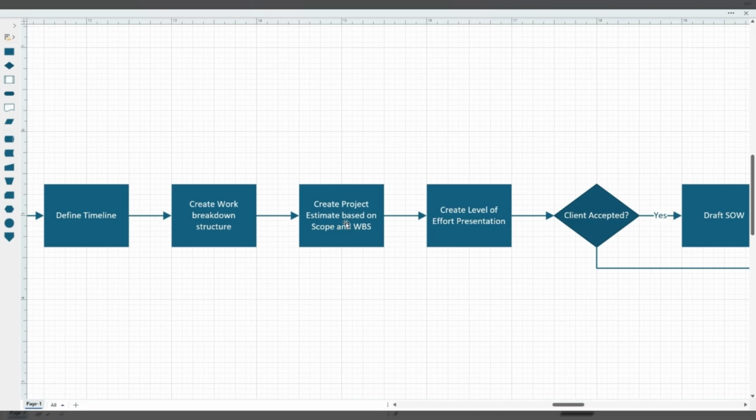This is difficult and very involved in the consulting world, because I may have an architect that is billed at a certain rate and a junior developer who's billed at a completely different rate. So that will affect what the overall price that I put forward to my client is going to be.